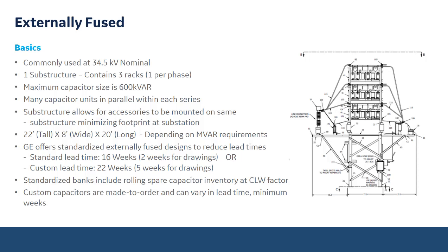And if you go to a custom capacitor design, that lead time for drawings does increase pretty significantly from 2 weeks to 5 weeks. And then you'll see the ship time goes from 16 weeks to 22. So there's an advantage of utilizing a standard capacitor bank.